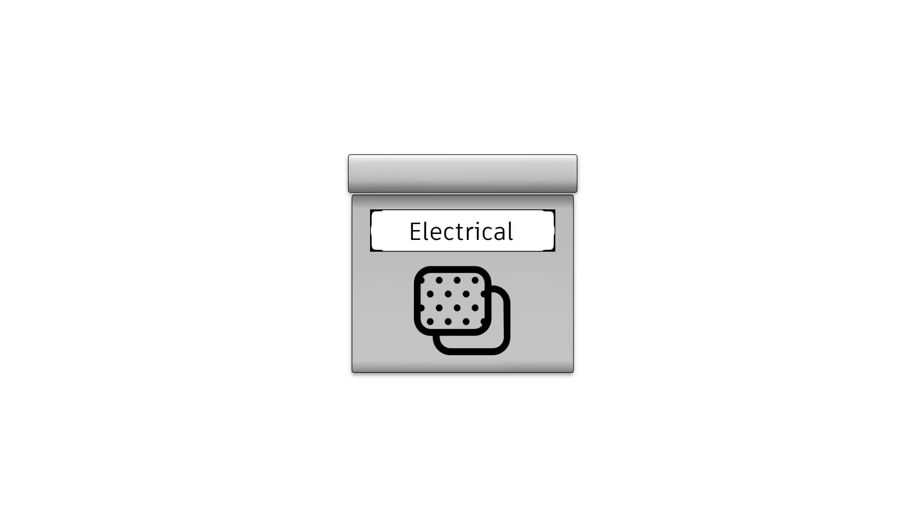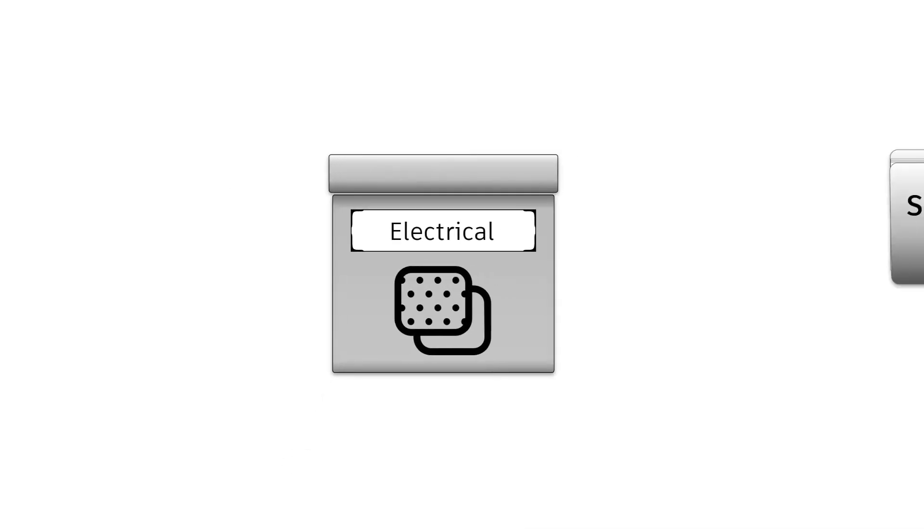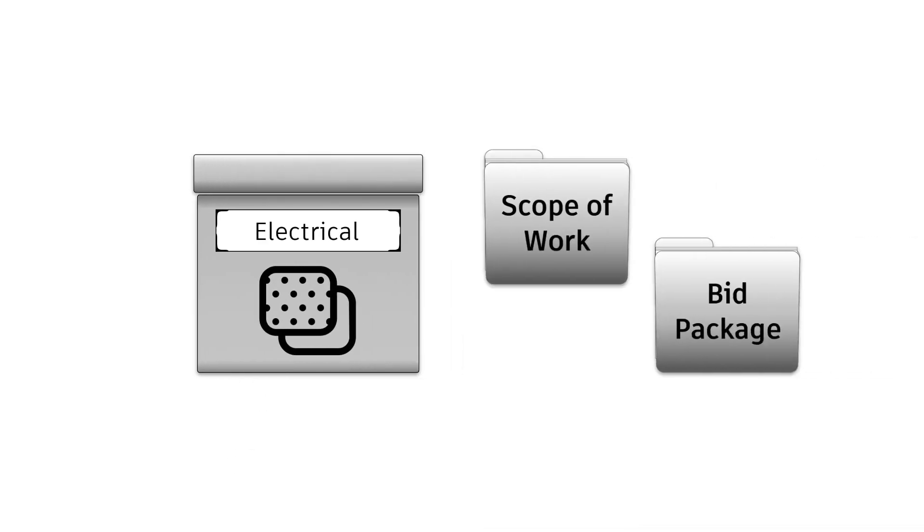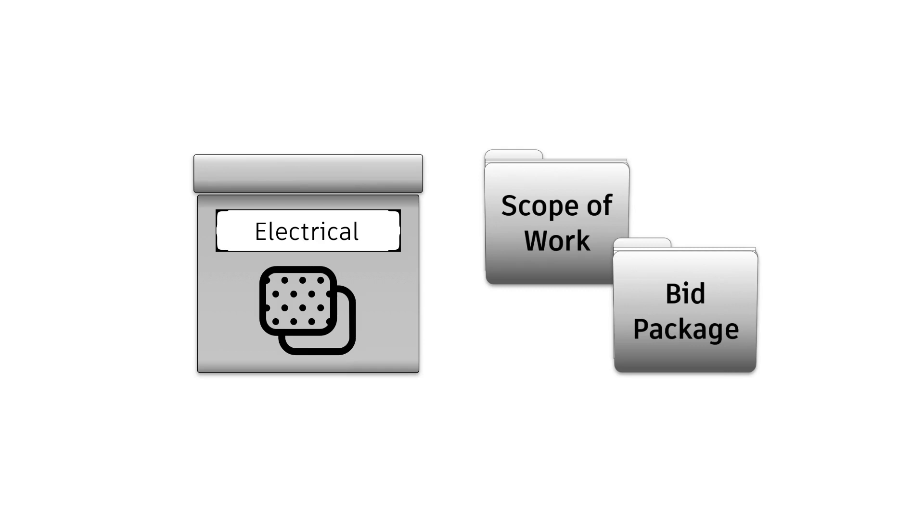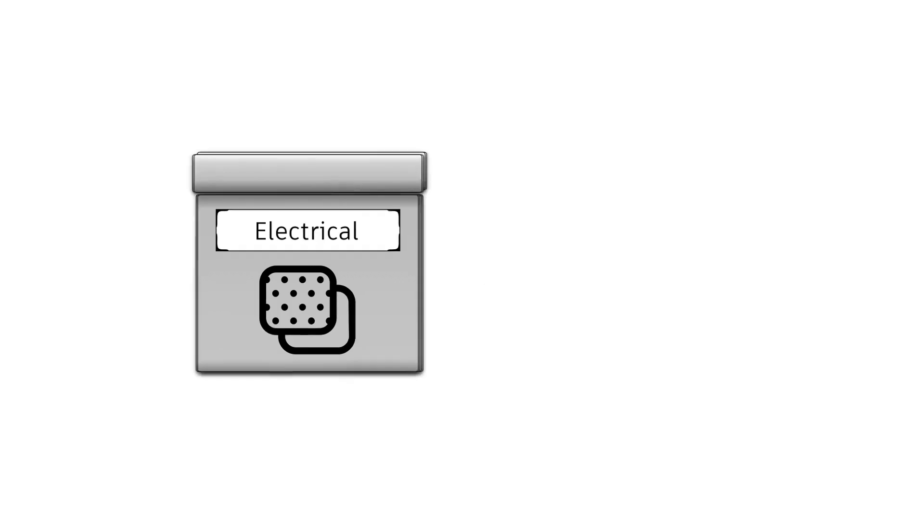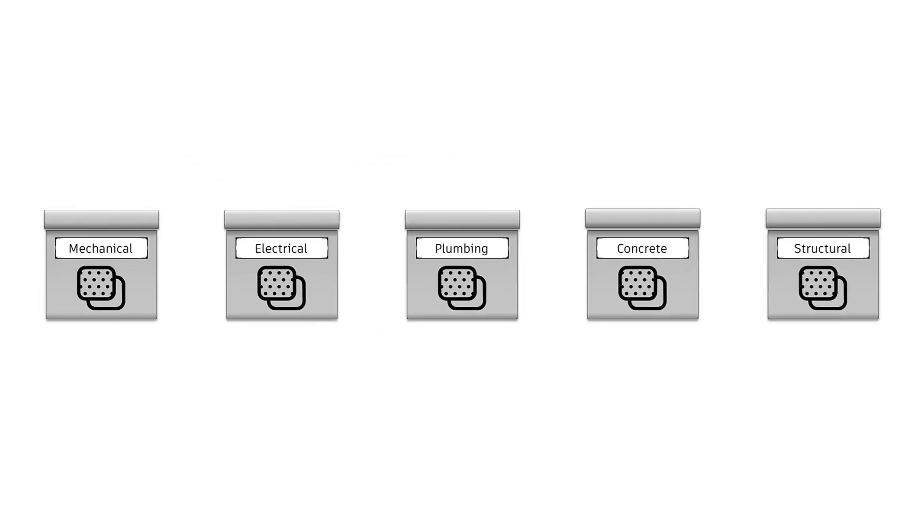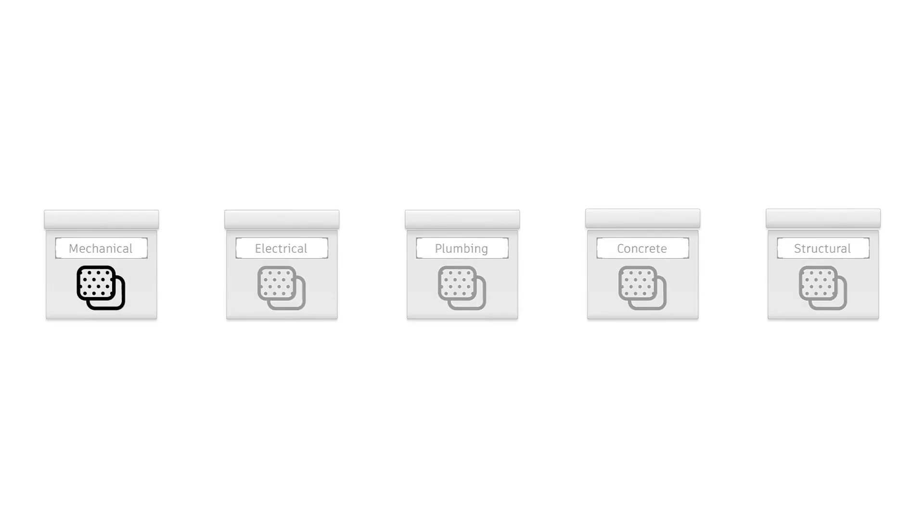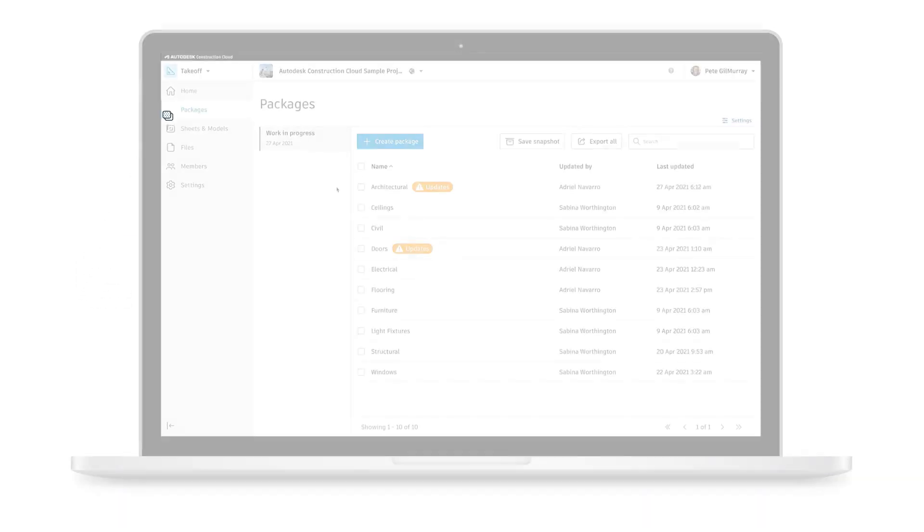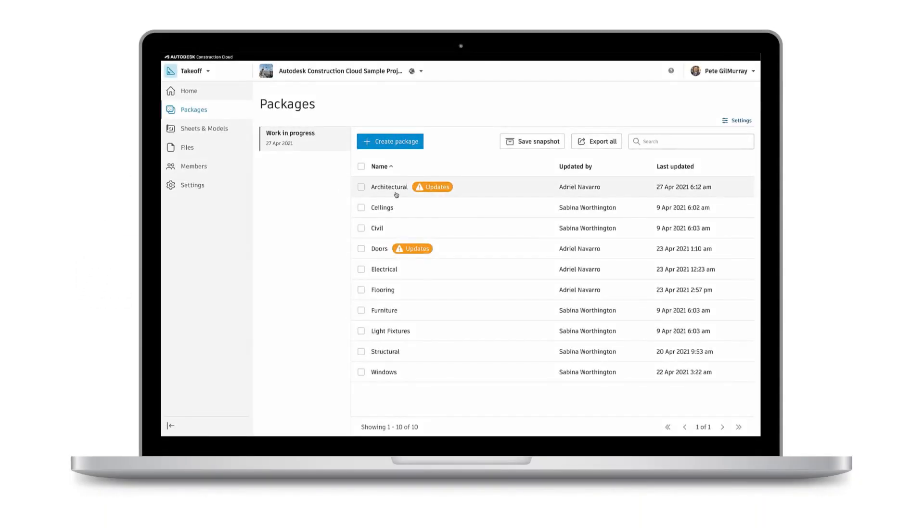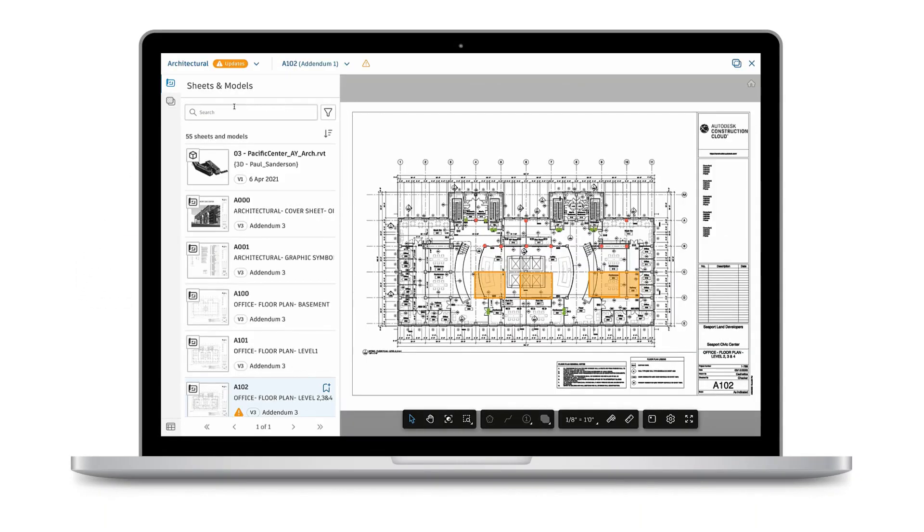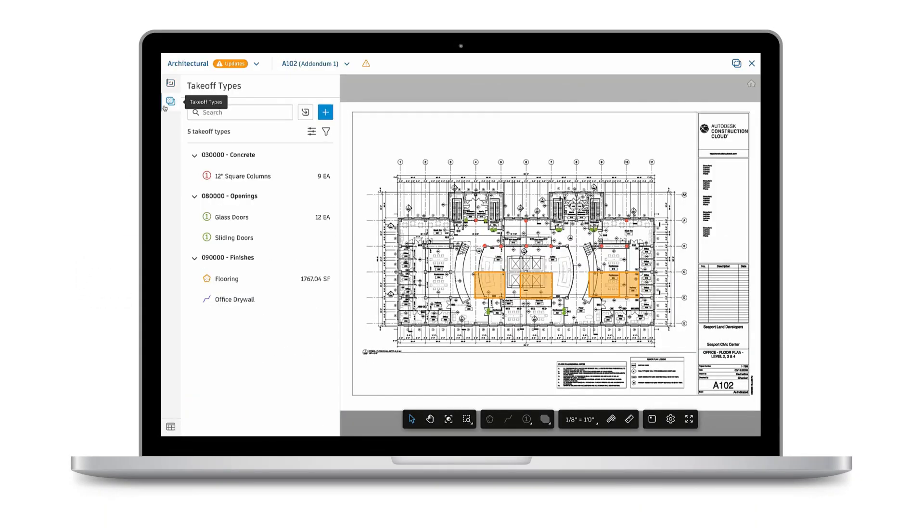The concept of a package might be familiar to you as a scope of work or bid package, and a single construction project may be comprised of multiple packages. Each package organizes the takeoff work relevant to its part of the project.